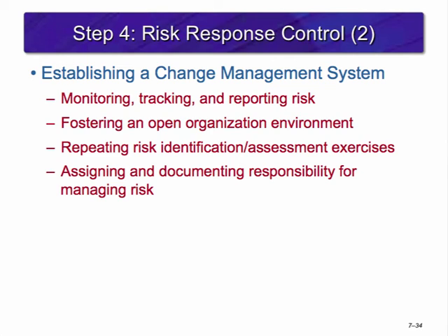It is up to the project manager to create a safe environment where team members feel comfortable raising concerns and admitting mistakes. Mistakes are acceptable. Hiding them is unacceptable. It is advisable to repeat the risk assessment exercise with fresh information. Review risk profiles and make sure relevant stakeholders are brought into the discussion. All risks are to be assigned to a resource who has full responsibility in responding to that risk. Project managers as well as team members need to be vigilant in monitoring risks at all times.